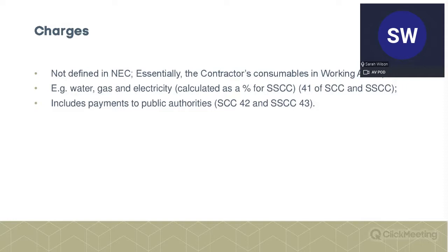So hopefully your people cost will be fairly representative, and the percentage you should hopefully have included in your contract data part 2, that we looked at the start. So you just need to think about that when you are preparing your contract data part 2. What would be an appropriate percentage for that extra consumption? And, I guess, if it's a really small compensation event, small value, it's probably minimal cost anyway, so it's probably insignificant.